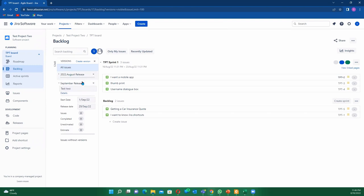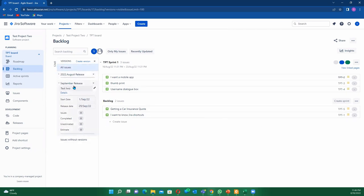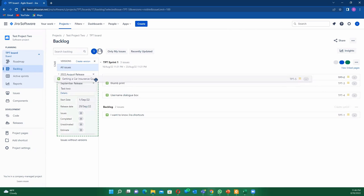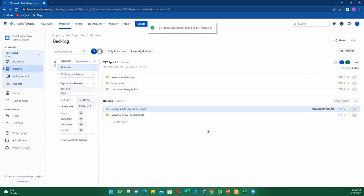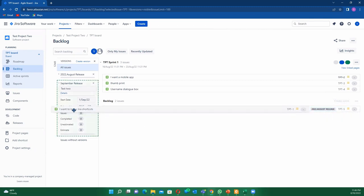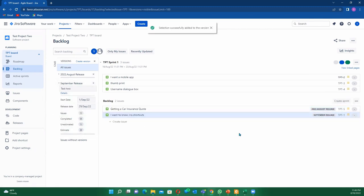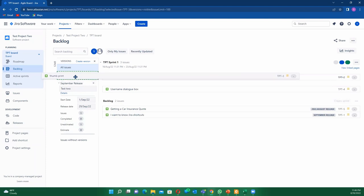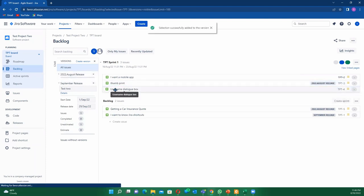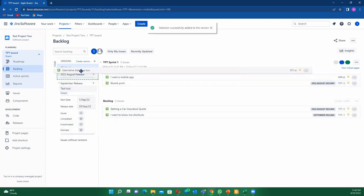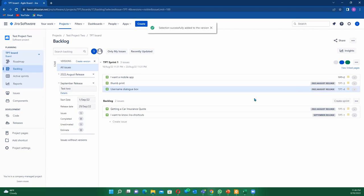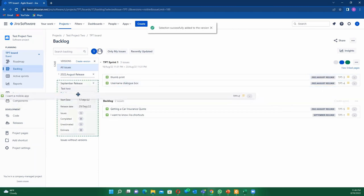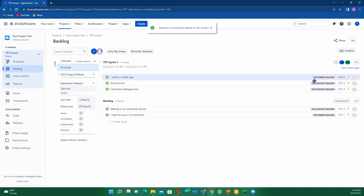We've created our August release and our September release. To ensure that your backlogs stay healthy, as I mentioned earlier, you need to ensure that both your releases are connected to your stories. How do you do that? It's simple—you just drag and drop it. We're going to put this in our August release. You can see it already appears here. Then we can bring this down into September release. All this stuff that you have here, you just drag and drop, so we are already building our backlog.